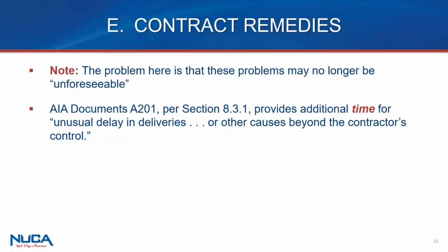And the owner saw the value in having the project completed earlier and paid more for it, though it wasn't legally or contractually obligated, rather than grant the time extension that the contractor had a right to, in order to get the project done earlier. Again, there was no obligation, nonetheless the contractor asked for it, and the owner saw the pragmatic reason to pay for it. And while the owner paid more, they got the project done sooner.